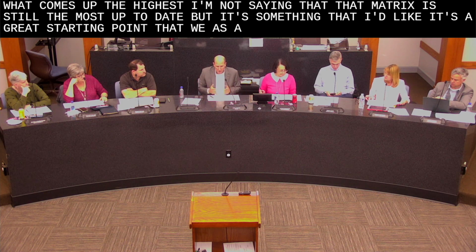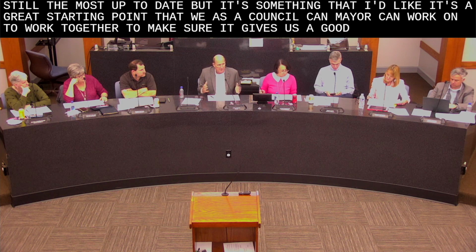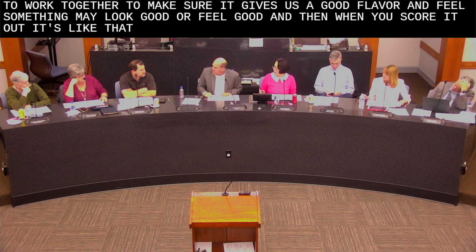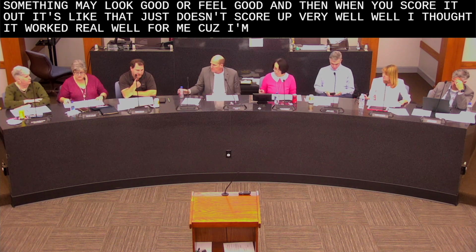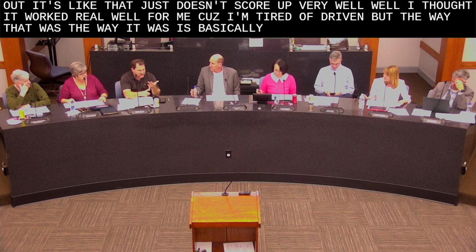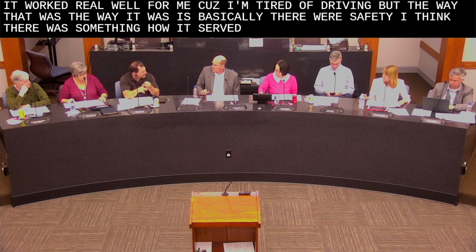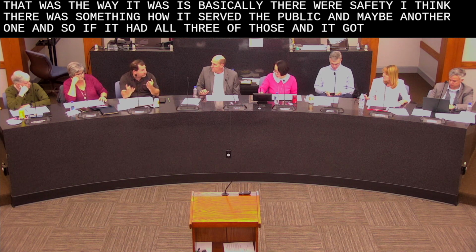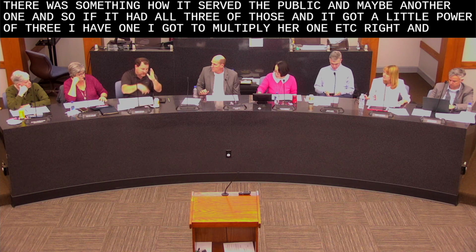That we as a council, Mayor, can work on together to make sure it gives us a good flavor and feel. Something may look good or feel good, and then when you score it out, it's like, that just doesn't score out very well. Well, I thought it worked real well. Yeah, particularly for me, because I'm data-driven. The way it was, there was safety, something about how it served the public, and maybe another one. If it had all three of those, it got a multiplier of 3. If it had one, it got a multiplier of 1, et cetera. And it basically just lines it up.